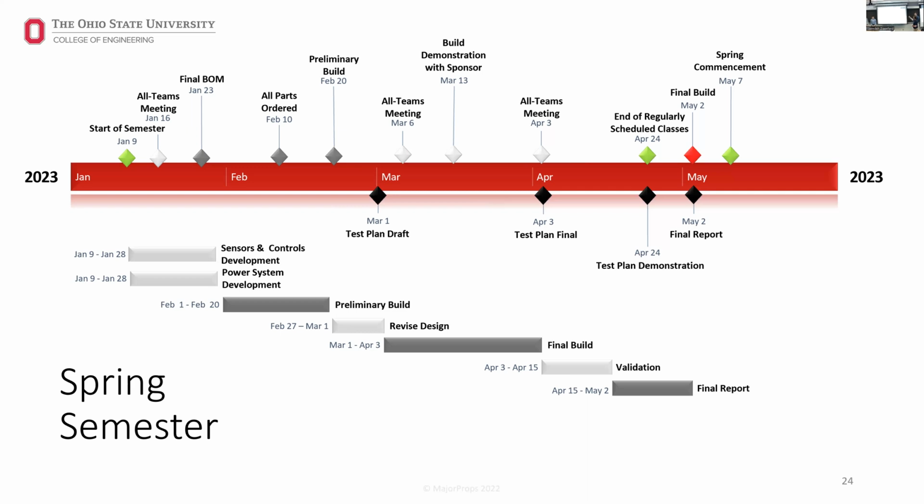As far as more administrative things, we really want to include all teams meetings next semester and have those scheduled the first week, where everybody is aware of when the dates are, where it's going to be and what we're going to talk about. So we've got one at the very beginning of the semester, one in the middle, and then one 3 weeks before the end of the semester. So we're hoping that planning these early is going to allow everybody to figure out their schedule and meet, and we're not going to have to suffer the difficulties we've had this semester with communication.